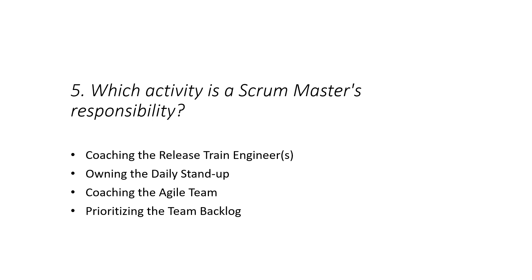Which activity is a Scrum Master's responsibility? The options are: coaching the Release Train Engineers, owning the daily standup, coaching the agile team, and prioritizing the team backlog. Coaching the RTE is not a Scrum Master's role. Owning the daily standup belongs to the team. Prioritizing the team backlog is the product owner's responsibility. The right answer is coaching the agile team.